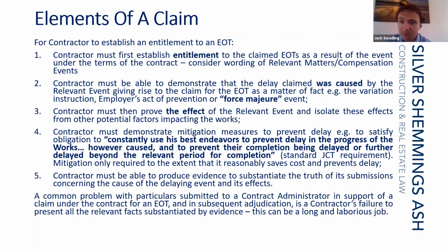These are the things that you need to be establishing anyway with your extension of time claim, whether that be after serving a notice with your particulars of the delay, or if the requirement is prospective, such as under the NEC form of contract. It will follow the same format, and it will follow the same format if there is a full-on dispute about what the contractor's entitlement is to the extension of time. It's primarily a matter of proving facts.